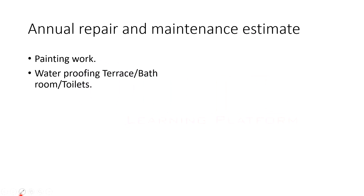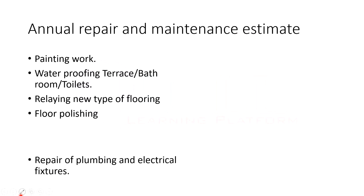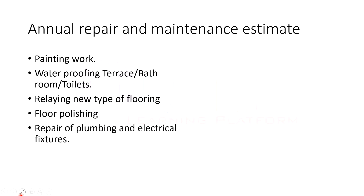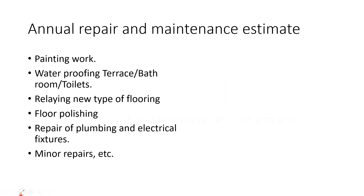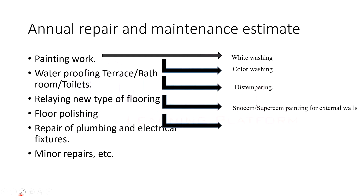Annual repair work for buildings includes: painting work, waterproofing of terraces, bathrooms, or toilets, relaying new flooring, flooring polish, repair of plumbing and electrical fixtures, minor repairs, whitewashing, color washing, distempering, painting of external walls, and repairing doors, windows, and ventilators.